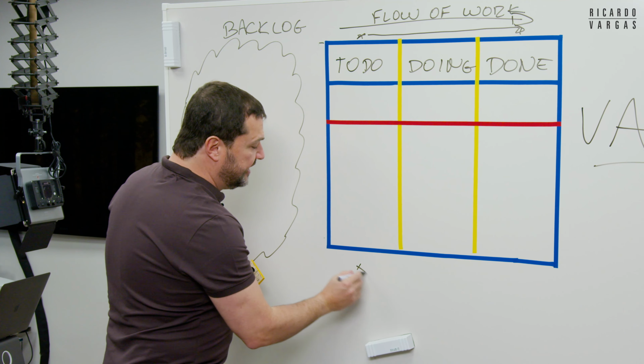For example, if you have only capacity of approving 2 items at the same time, the approval will be in some ways a bottleneck. Imagine that you have resources for the others. And then only 2 post-its will stay on that specific column. And this is just an example.